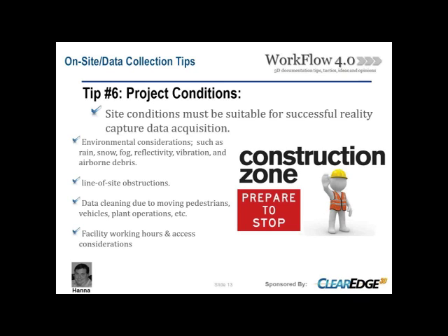Matt mentioned it earlier, line of sight obstructions. We're asked to do a lot of scanning up in ceiling tiles. Well, an obvious question is, who's removing those tiles? Is the service provider tasked with doing that, or is the client going to have an appropriate person in place to do that? That's real important. Those line of sight obstructions need to be considered and dealt with before you get on site.